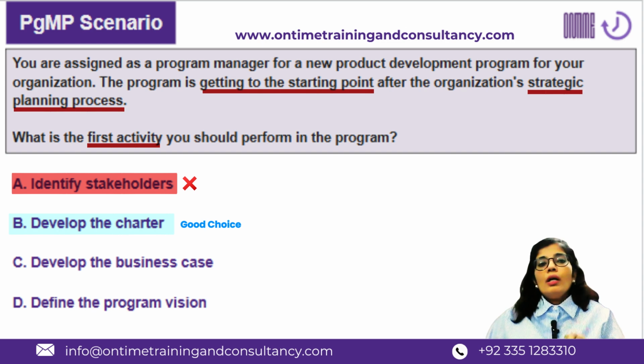With that document, it formally announces the program manager in the organization for that particular initiative, and it gives you a platform, a particular document to reference the high level details for scope and schedule and budget and resources and risk and constraints, dependency and all. So charter is a definite input to the planning exercise later in the program